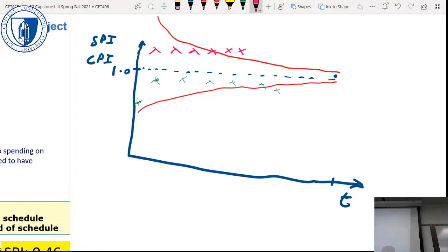And for whatever reason, if there's other projects in the portfolio that aren't going as well, that's telling me I can reassign people. Right? Maybe not many, but if I'm happy with the due date being whatever the plan told me it was going to be, the pink project is a place where I can look for help for the other projects.